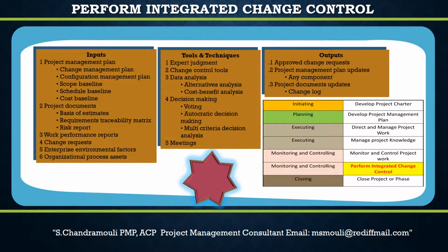Number 4. If the customer still wants the changes, discuss with the management, sponsor and other stakeholders. Number 5. Based on their inputs, if the change is warranted, a change control will need to be formally opened, necessary approvals received, and then the team can work on the required changes.